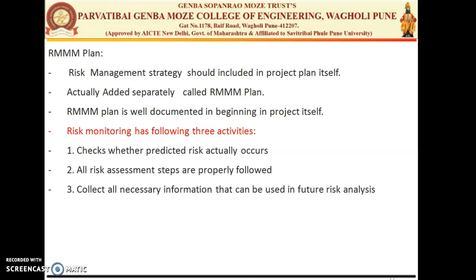Again, I will explain one risk, that is a computer crash. If we take the three steps in computer crash, the mitigation step is nothing but avoidance. It will try to avoid the computer crash, because whatever important data the computer has will get lost. For that we need to maintain multiple copies of the data.